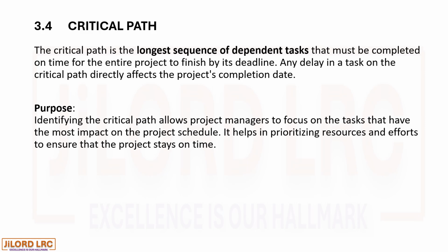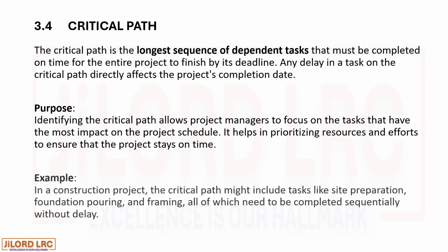Purpose. Identifying the critical path allows project managers to focus on the tasks that have the most impact on the project schedule. It helps in prioritizing resources and efforts to ensure that the project stays on time. For example, in a construction project, the critical path might include tasks like site preparation, foundation pouring, and framing, all of which need to be completed sequentially without delay.